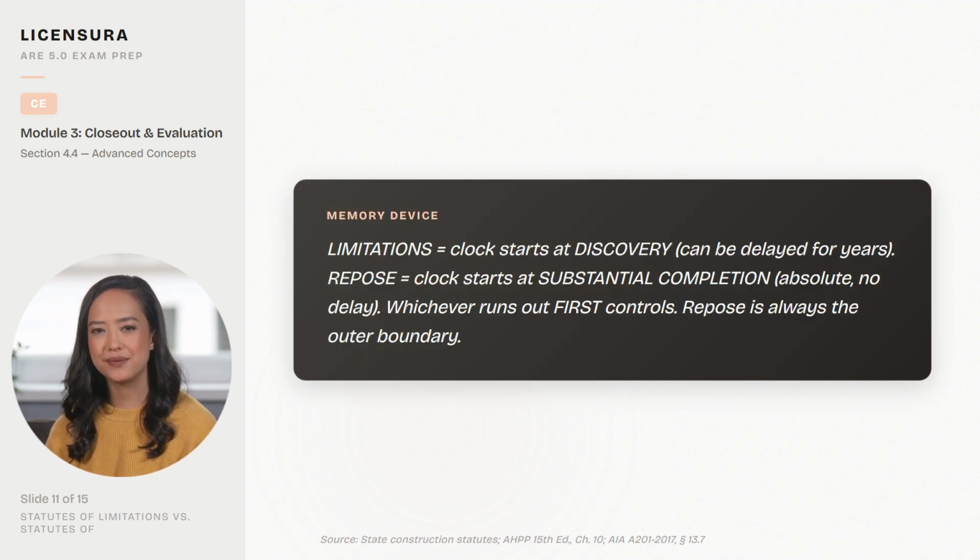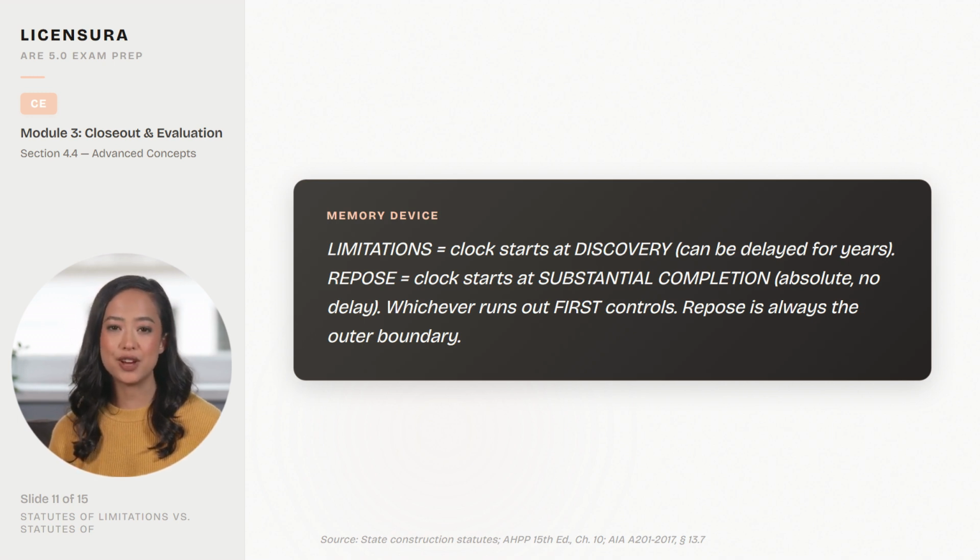Here's a memory device. Limitations equals clock starts at discovery. Can be delayed for years. Repose equals clock starts at substantial completion. Absolute, no delay. Whichever runs out first controls. Repose is always the outer boundary.